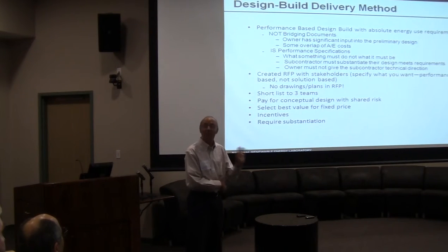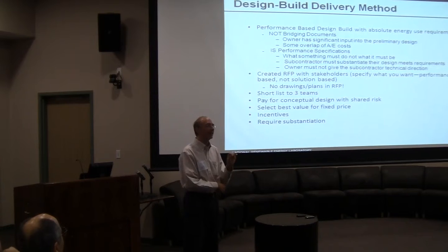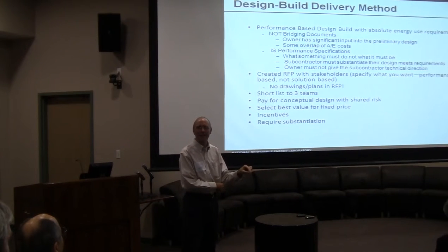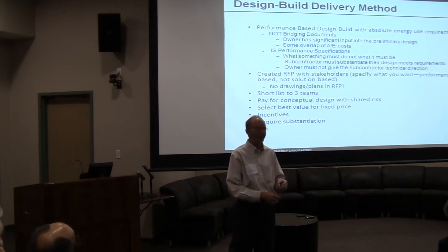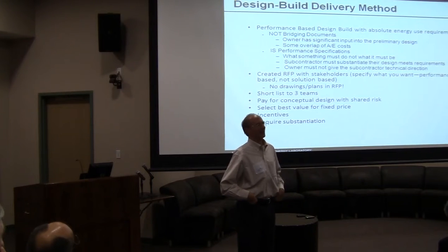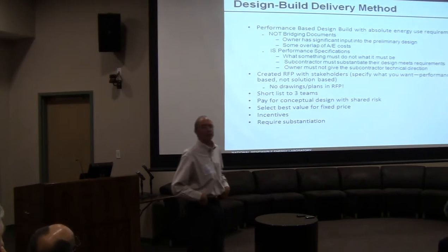We've already paid for that, right? That's what the contract said. If they exceeded the expectation, like if they came in and said, well, we thought of a bunch of things, instead of 25, we think we can do it at 24,000 BTUs per square foot. Well, that's exceeding expectations. And so we would cut them a check for that.